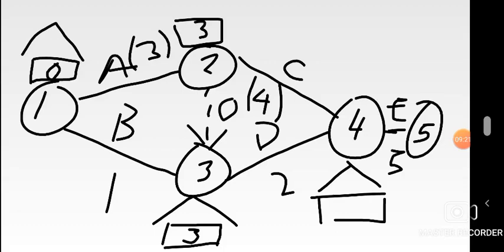So from 3 to 4, you already have 3 days in the backup first as a startup, and then another extra 2 days. You've seen the route leading from 3 to 4, there's another 2 days. So what I've just done is that I used first of all the 3 which has been allocated as when 3 should start. Now from 3 to 4, you want to know when 4 should also start. So first, where 3 has used up its 3 days, then now you lead to 4.